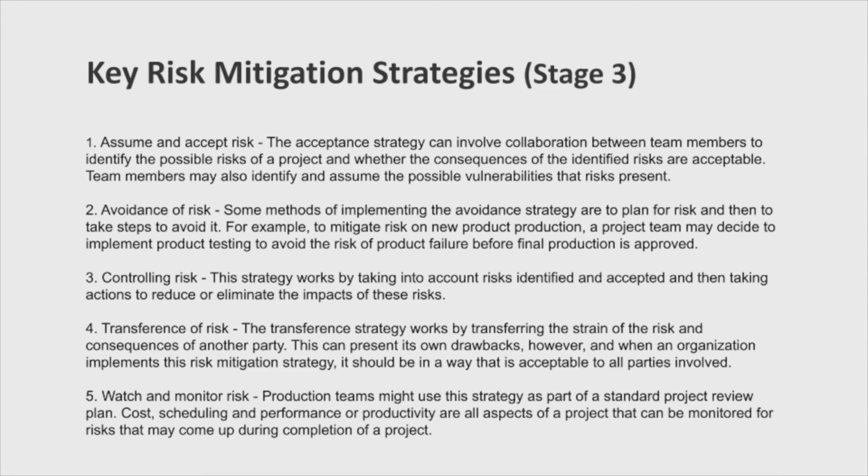The thing is, when we buy insurance, if we do have an accident, that company that we purchased the insurance from assumes a risk for us. That's what's known as transferring the risk. Again, transferring risk can be expensive. Insurance gets expensive, for example, so we need to work with it in terms of this issue of transferring. We need to work to ensure that all of the other things are in place too, such as controlling risk or potentially avoiding risk.